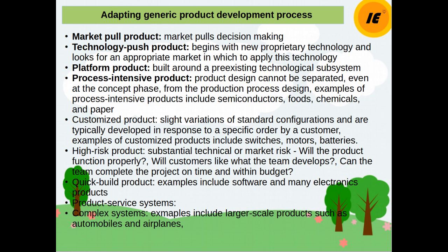The system level design phase becomes critical. During this phase, the system is decomposed into subsystems and these further into many components. Teams are assigned to develop each component. Additional teams are assigned the special challenge of integrating components into subsystems and these into the overall system.